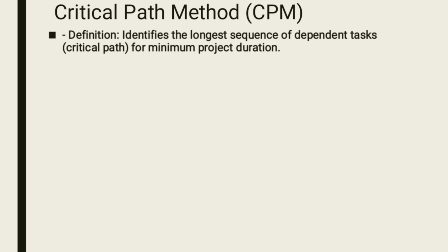From there, you need to come up with a network diagram. In that network diagram, each task will be associated with a number of days. That network diagram is going to give you the paths you are going to move along. You need to focus on the path with the highest number of days, or the highest amount of time. So that is the critical path method.